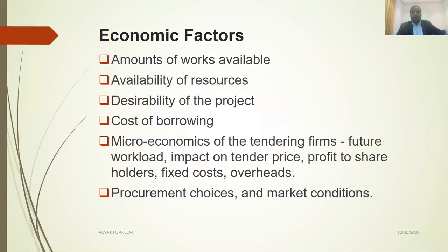When there is more quantity, there is always a chance for less cost. Also availability of resources. This is the major issue especially in Qatar, the lack of labor resources nowadays due to the COVID pandemic, maybe everywhere in the Middle East due to travel restrictions. When there is a non-availability of resources, definitely the cost will go high.